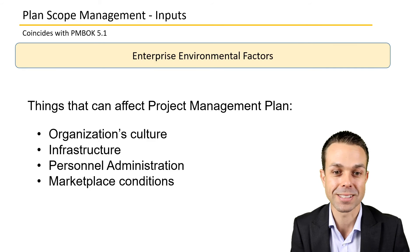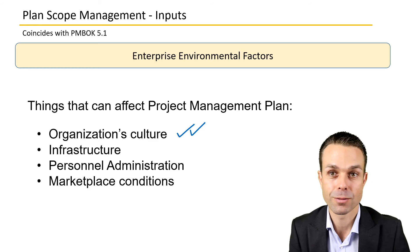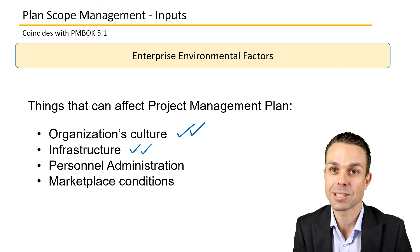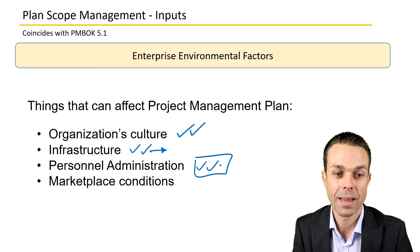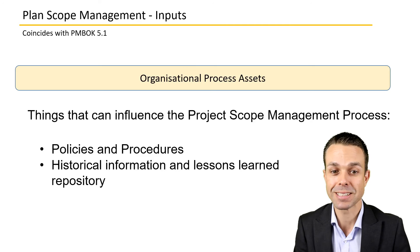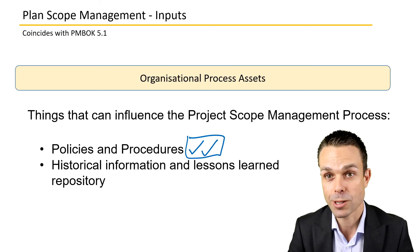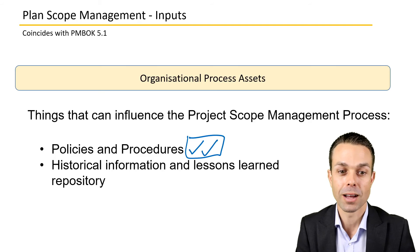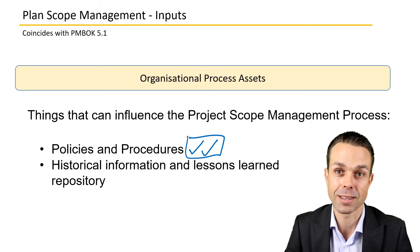EEFs for Planning Scope Management include the existing organization's culture — how is work done, through formal templates or a PMO, or through informal conversations? Also relevant are existing infrastructure and systems, programs in use, personnel administration for getting resources, and marketplace conditions. Organizational process assets include policies, procedures, templates from a PMO or functional management environment, as well as historical information and lessons learned from previous projects.